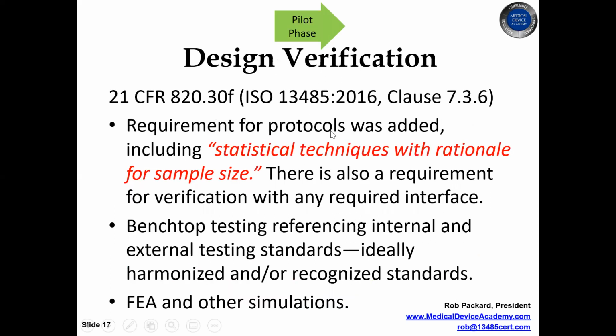In the pilot phase or design verification phase, one of the changes they made is you have to use statistical techniques with a rationale for sample size. That's also under design validation. Otherwise, it's basically the same, but this is where you're going to be performing all your benchtop testing. It could include FEA or simulations, but those are typically involved in the design validation process. And the design verification is typically benchtop testing. Design verification includes biocompatibility testing, sterilization testing, electrical safety, EMC testing, and possibly performance tests.